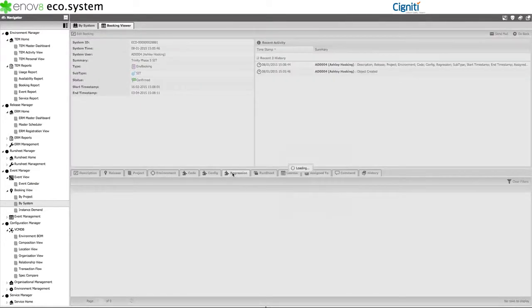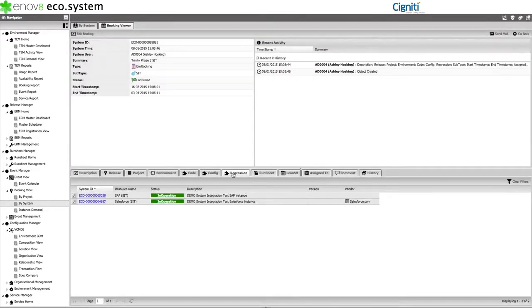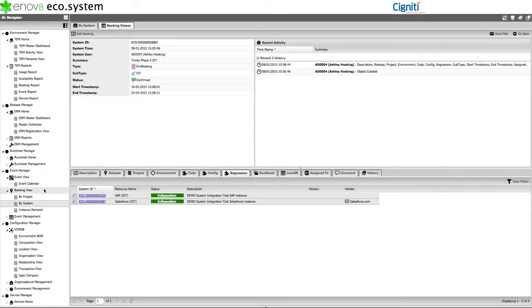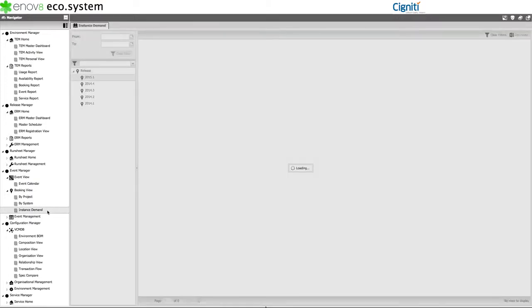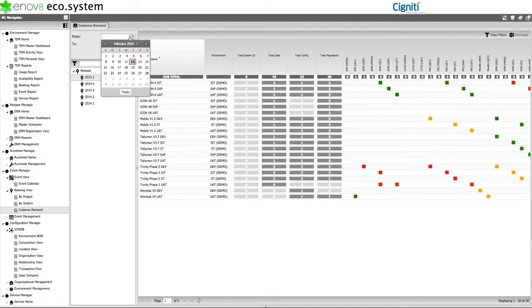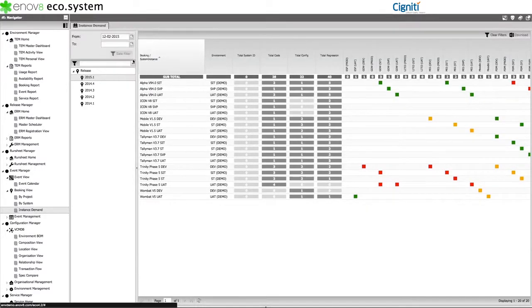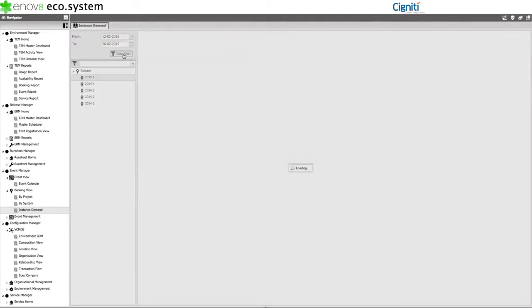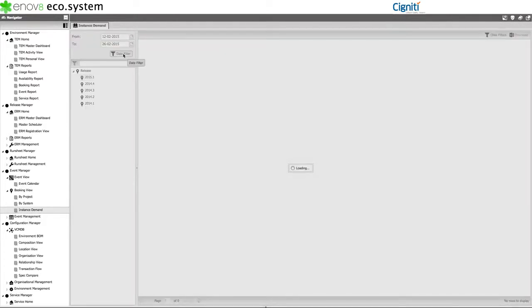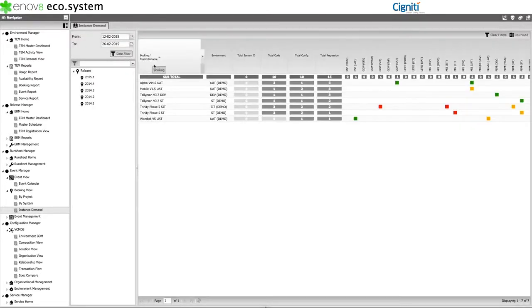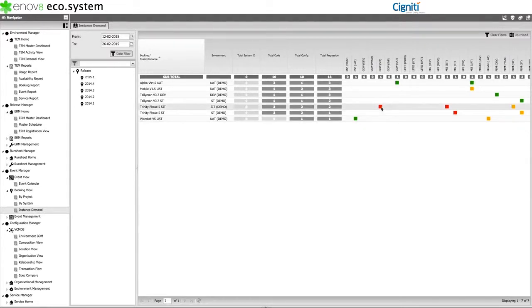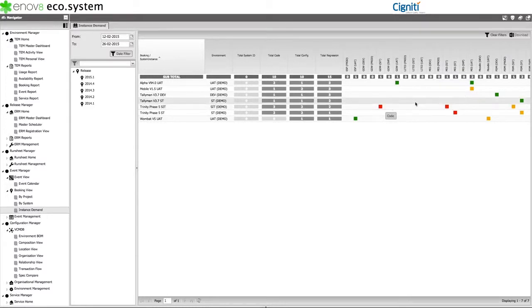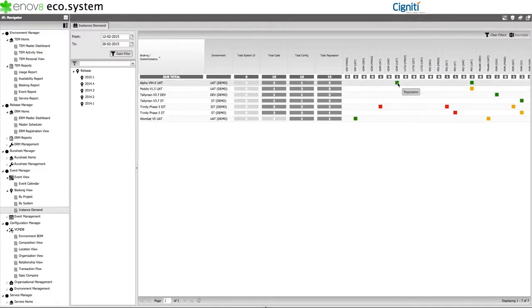In addition to project and system views, the Ecosystems Booking Manager allows you to identify whether there is likely to be resource contention through the Instance Demand Matrix. A useful view that allows you to identify which project bookings are using which system instances during a particular release or time period and also how they are using them. For your information, usage is identified through color coding of the booking and instance cells. A red cell means that the booking is making an instance code change. An amber cell means configuration change. And, a green cell means that instance is required for regression purposes only.